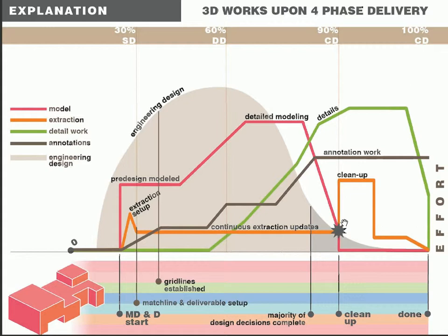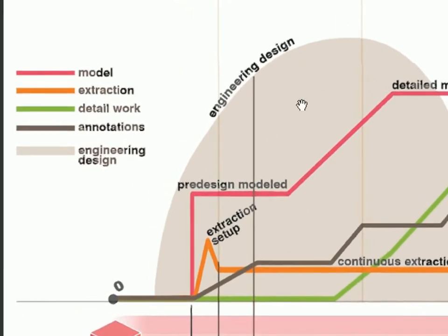It's critical that this happens in this manner, because just imagine if that decision hump, the gray hump behind, if that's pushed over to 90%, everything else that's supposed to happen gets compressed. So that's the main impact, is to understand the scheduling ramifications and ensure as design or project managers that decisions are being made in a timely fashion. And that'll just ensure a smooth BIM process.